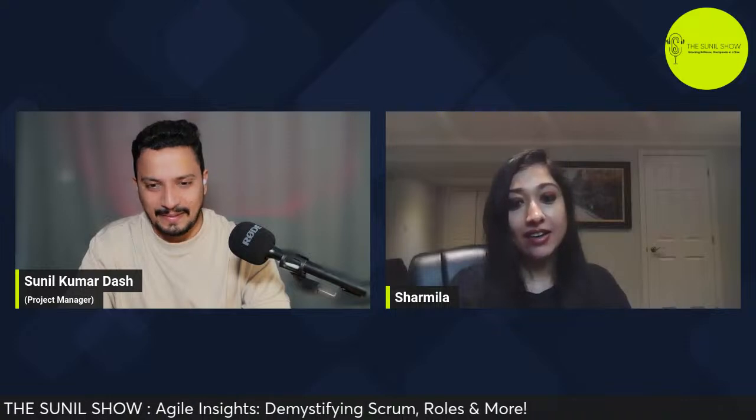Again, a very interesting question. So when we are starting the sprint, what we might do is the product owner, the scrum master, and the development team might come together to discuss. Okay, we will be taking on these 4 or 5 user stories, and each of these user stories might be, let's say, 8 points each, right? So we are considering 8 into 5, which is 40 user story points to be delivered in this first sprint of 2 weeks.